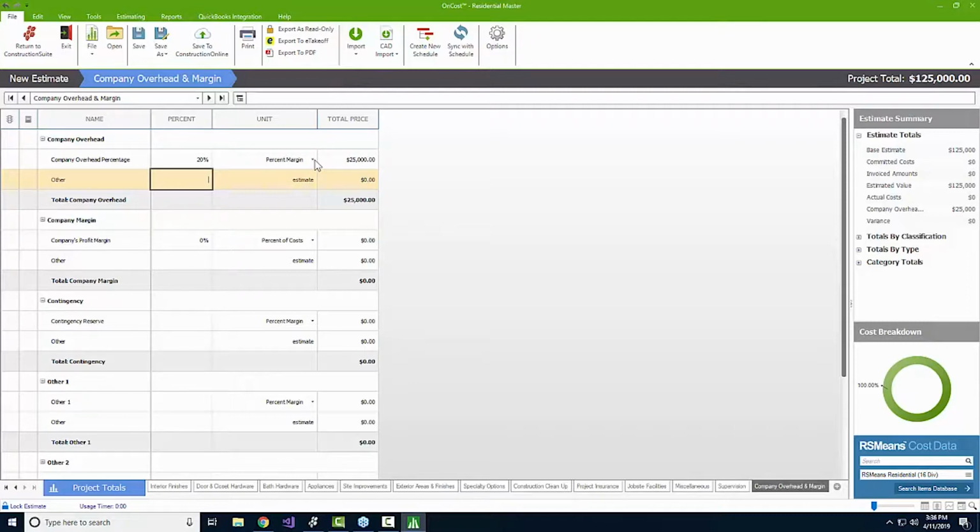So when you say, what is our, I already see one of the questions come through, what should we use as a target margin, or what should that be? Well, take a look at what you want your numbers to look like in QuickBooks. If you're looking at how much it costs you, and then from that you figure out how much money you want to make, for a lot of residential builders, for example, that gross profit, or the gross margin, is usually going to be somewhere around 30%. Maybe a little more, maybe a little less. For residential remodelers, the recommendation is usually a little higher, maybe 35. I've seen some commercial builders who get that number down to maybe 15%.